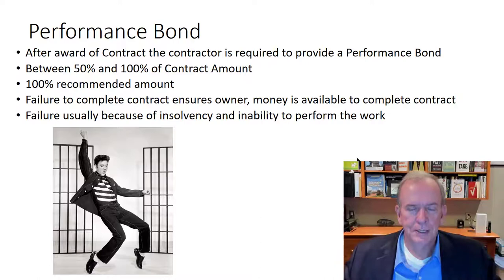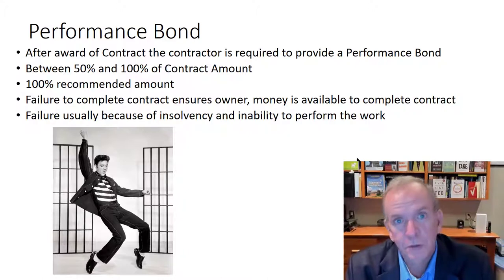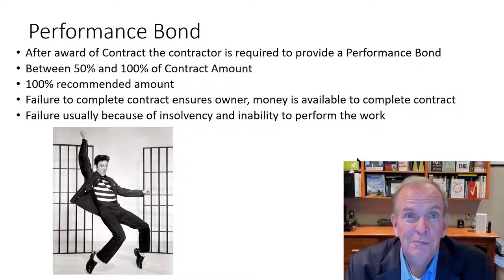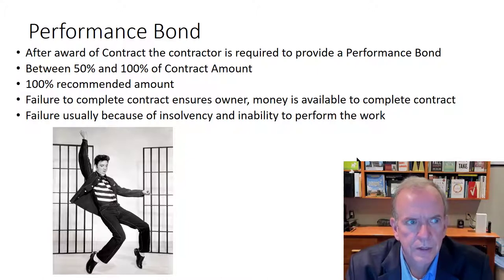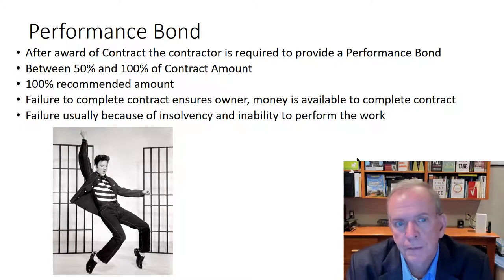The performance bond is about doing the work — the bid bond is about getting the work, the performance bond is about doing the work. Are you performing to the contract? Has something happened — probably bankruptcy — that means you can no longer complete the contract? Companies like Bond Field, Carillion, or Olympian York have probably had performance bond issues at certain points. If you're unable to complete a project you started, the bonding company has to take it over.